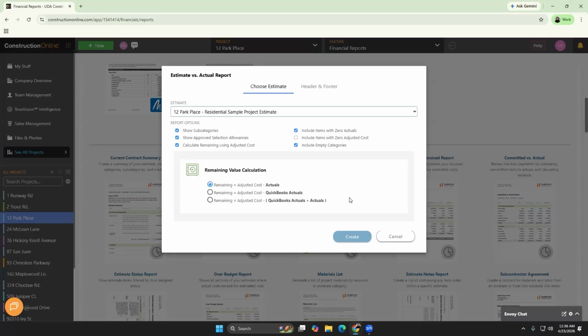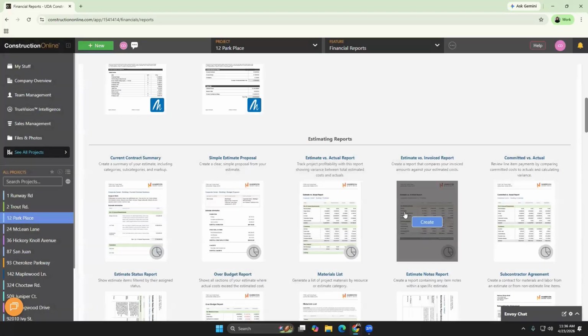This gives you the power to take accountability for that and improve that actively if you're going over budget. Because if you're only looking at the actuals, you can get a false sense of where you are on the job. That variance column is what tells the real story. And having it broken down at every level of the estimate structure means you can see exactly where a job is drifting before it even becomes a problem.